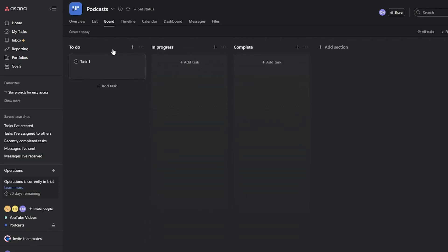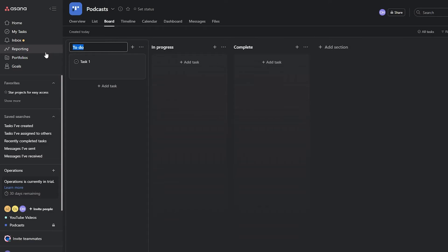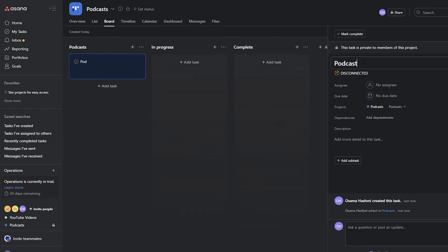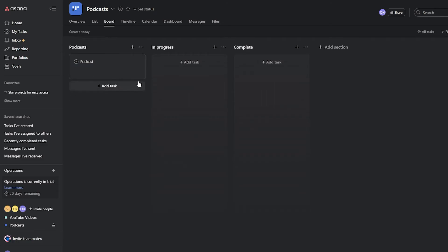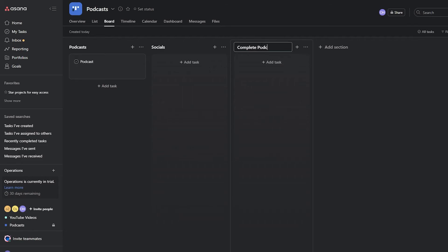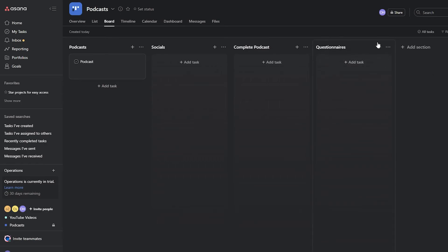Inside the new Podcasts project, the to-do list will hold the podcasts. I'll add columns for Podcasts, Questionnaires, Socials, and Completed Podcast — arranging them so Questionnaires comes before Socials. This gives us a clear workflow for managing all podcast-related tasks.